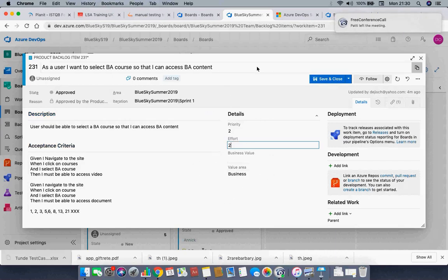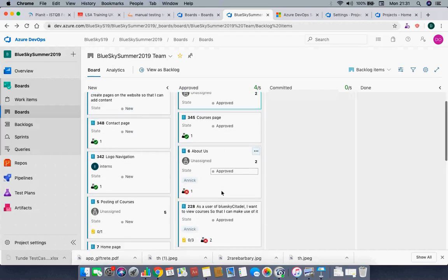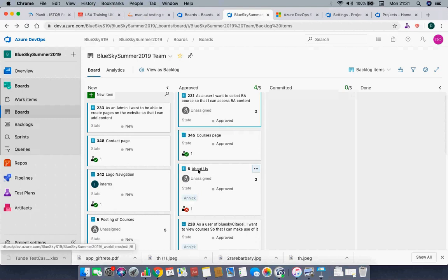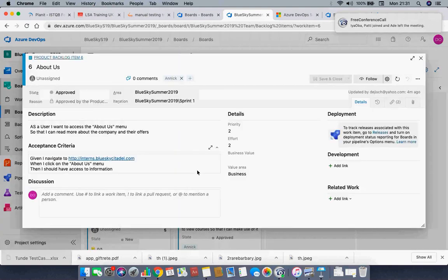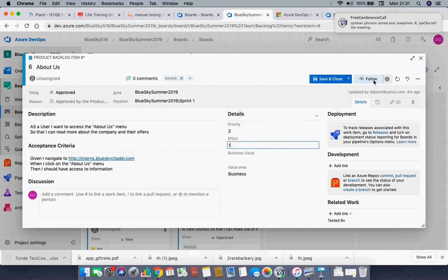And now, besides the number of days, I've worked in some companies that don't use days. Actually, they use complexity. They look at that story and compare it with another story. Let me go back and close this story. So we look into this story. Let's say this story right now is just the about us page. Basically, we are only going to change the text, no much development, just a label change. Change the about us and make sure it's something about the company. So we can say that is one point, in terms of effort, in terms of complexity.